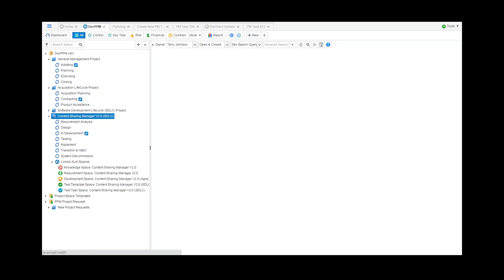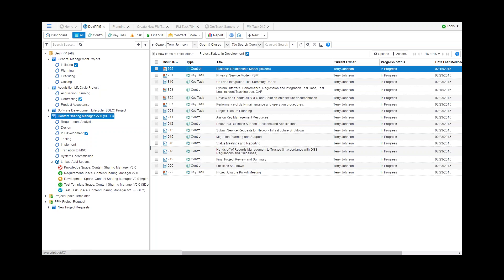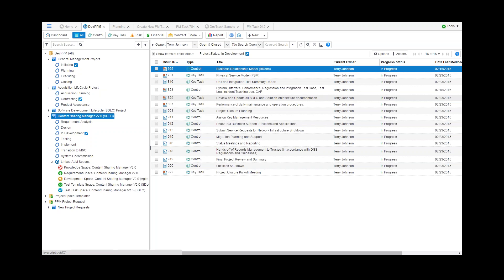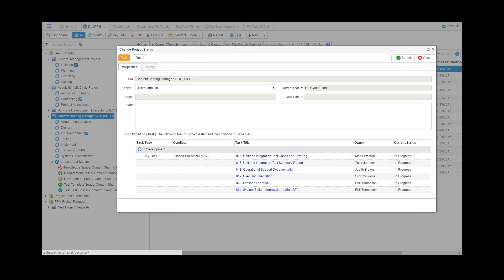Back to the software development project. The management tasks represent how you want to define the workflow, the user interface to manage all types of possible management and control tasks such as risk, financial contract, customer satisfaction. The key tasks are defined to be those tasks that must be finished before you can move a project status from one milestone to its next milestone. For example, currently this software project is in the milestone phase of team development. If you want to change the project status, it will remind you that the following six tasks must be closed successfully in order for you to move the phase from current phase development to the next phase testing.